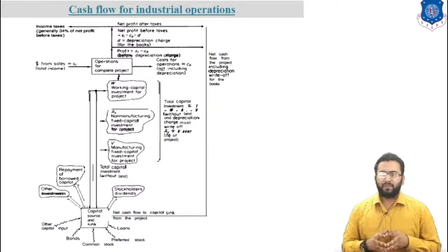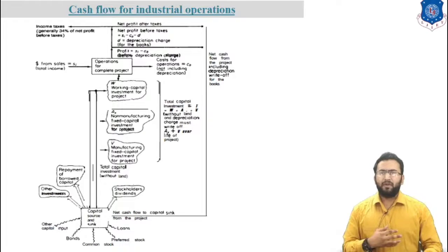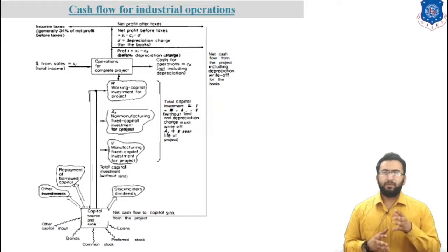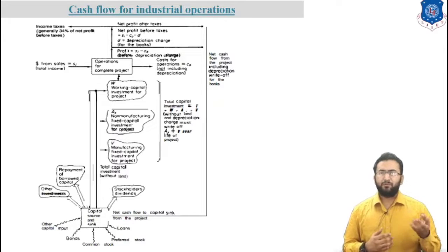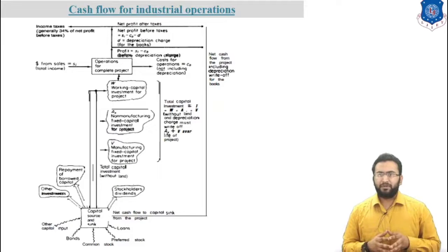the complete plant. Because receipts from sales and necessary operating costs occur on an irregular time basis, a constant reserve of working capital must be kept on hand continuously to draw from as needed. The rectangular box in this figure represents the overall operation for the complete project, with working capital funds moving in and out as needed, but maintaining a constant fund as available working capital.